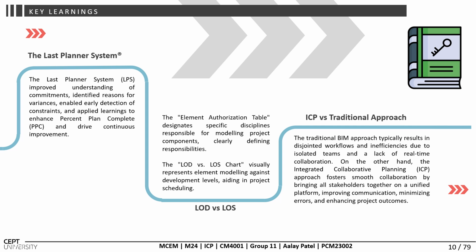LOD versus LOS. From that, we learned that the element authorization table specifies the responsible author for modeling project components, clearly defining their responsibilities and roles. The LOD versus LOS chart visually represents element modeling against the development levels, which aids in project scheduling.